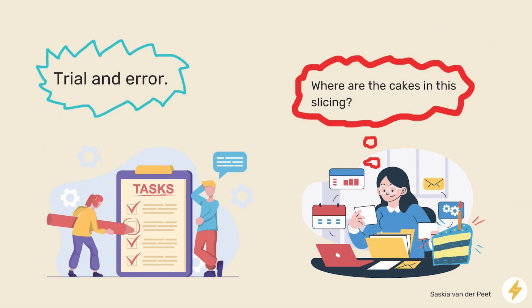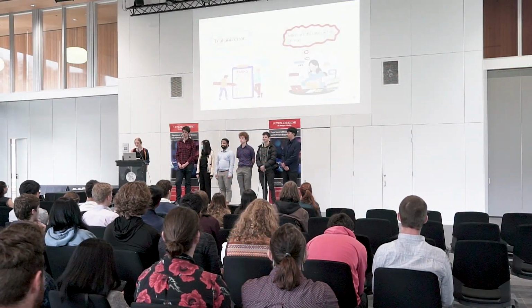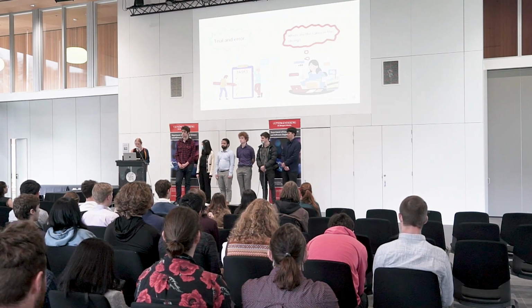Throughout the project, we struggled a lot with task breakdowns. We tried vertical slicing of user stories only to find that our tasks were too large and sometimes were 22 hours long. Then we tried horizontal slicing because, despite Fabian's warnings in SENG 301, we apparently thought we knew better. We encountered a lot of merging and crossover issues with this approach, leading to implementation errors and bugs in our application.